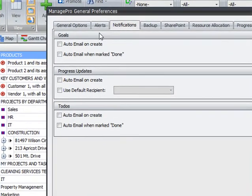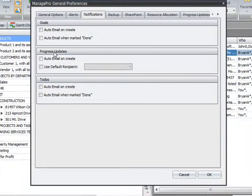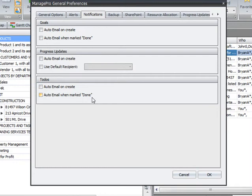From here, you can select to automatically email goals, progress updates, and to-dos. And you have the choice of emailing automatically when they are created, and or when they are marked done.